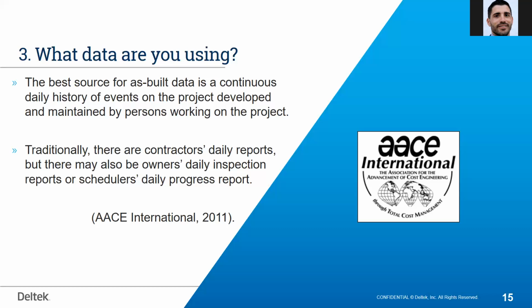In fact, I've been on projects where we were receiving updates as a customer, but we were not accepting the schedules. Schedules were piling up, and then we had to resolve claims in a very difficult way. I left that project after 2 years on the team, and I don't think they had resolved these issues. What they chose to do, they said at the end of the project, we're gonna resolve these issues as a whole package.